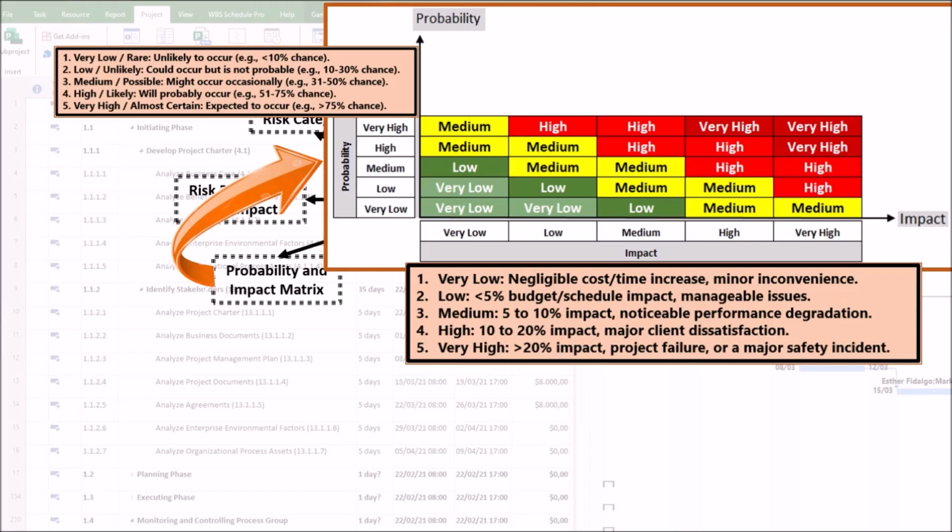For example, low, medium, high, or very high. This combined rating is often called risk exposure or risk priority. This process transforms individual assessments of likelihood and consequence into a single, comparable priority level. Interpreting the results. Action based on rating. The matrix is typically divided into color-coded zones to visually represent priority levels and guide responses.